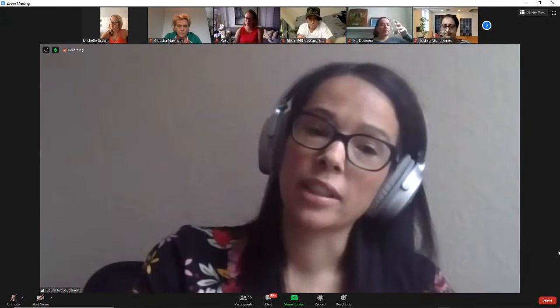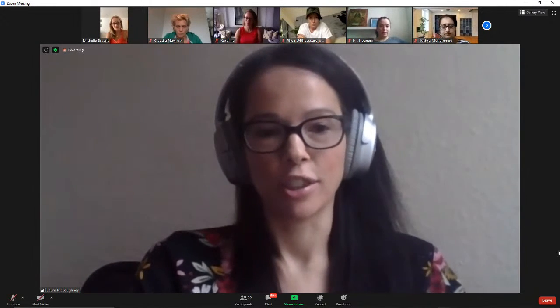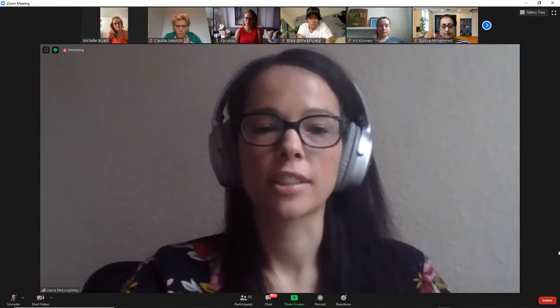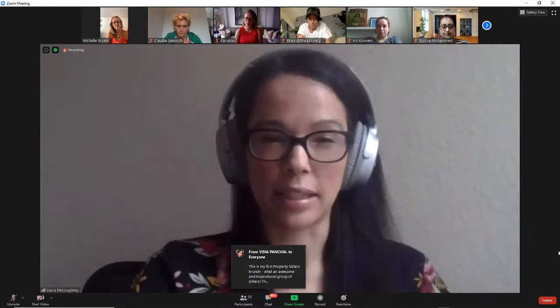Yeah, exactly. And that's where, for me, it comes back to the scope. That's where design and build contracts can be your friend or your enemy. If you work with a contractor and you've not been specific with your scope, they're just going to crack on and build what they think you want, which isn't necessarily what you want.